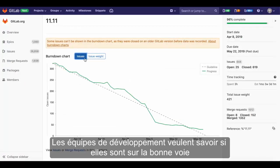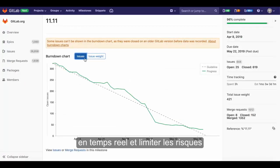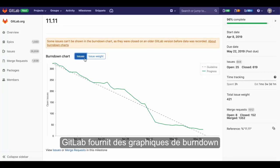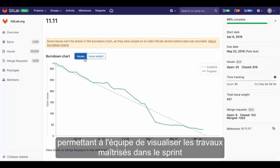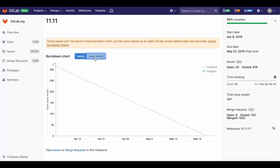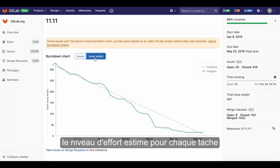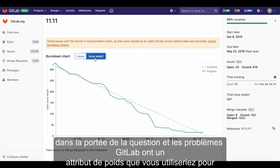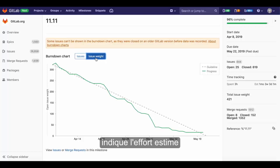Development teams want to know if they are on track in real time and mitigate risk as issues arise. GitLab provides burndown charts, allowing the team to visualize the work scoped in the current sprint burning down as items are being completed. The level of technical effort is estimated for each in-scope issue. In GitLab, issues have a weight attribute, which you would use to indicate the estimated effort.